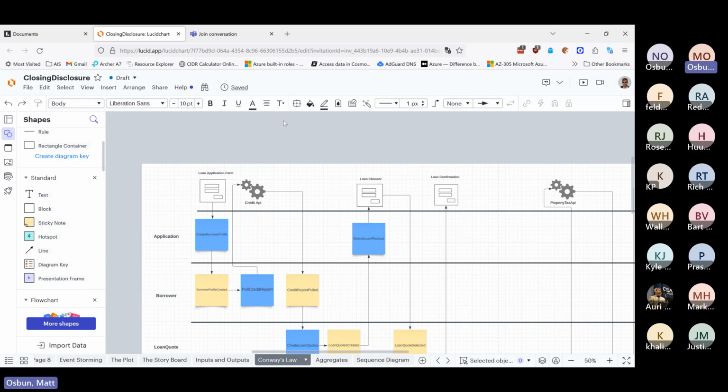And invariably, yes, at the end, someone goes, well, you did blah. I'm like, side checked, you know how to read. You signed off, this is everything you want. I write down who said it. I checked this with so and so, or I make a note of it, send this date, or I sent an email, or now, because we use Jira a lot, I @mention them and say, please confirm this completely.